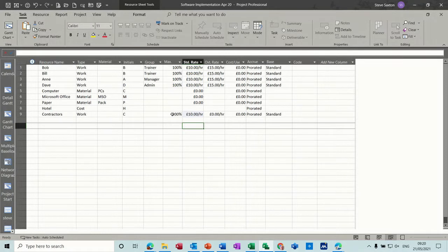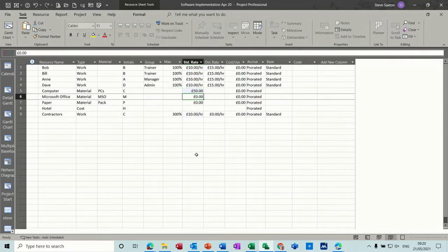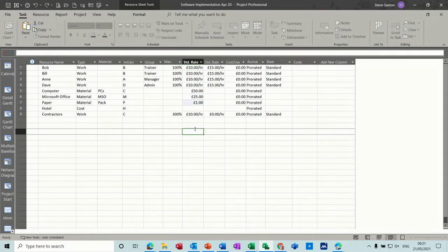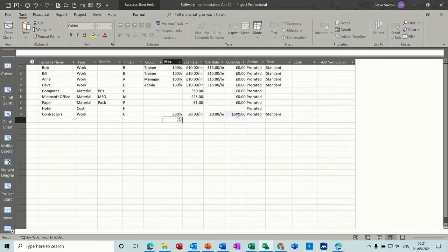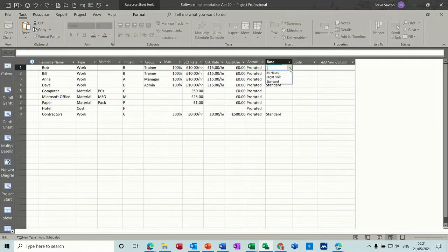The computer cost — every time you use a computer on a task it's going to cost 50 pounds. Microsoft Office every time you use a license is 25 pounds. Paper is going to cost 1 pound every time you use a pack. You could also put a fixed cost for the contractors of 500 pounds, so adding a contractor to a task costs 500 pounds regardless of how many contractors there are. They're all pro-rated but you can change this so the cost goes at the start or end. They all use the standard calendar, but you can create calendars specifically for a resource.